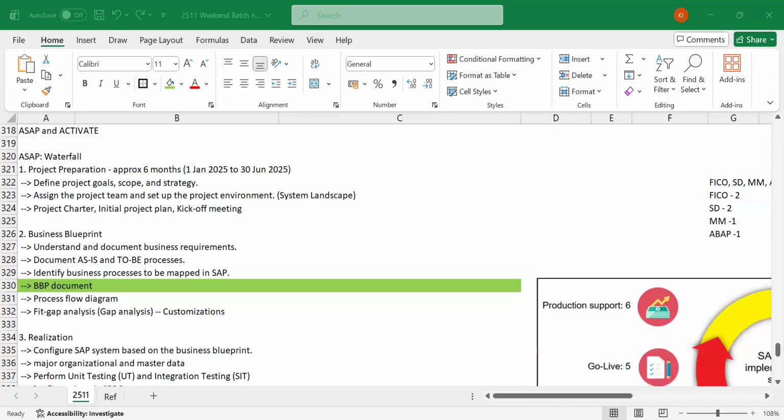It will not be easy, right? If I want to do any correction now at this moment, if I had known this 3 to 4 months prior, it would have been easy. Before I start painting, it would have been easy. It would have saved a lot of time and money, isn't it? That is the disadvantage in our waterfall methodology.